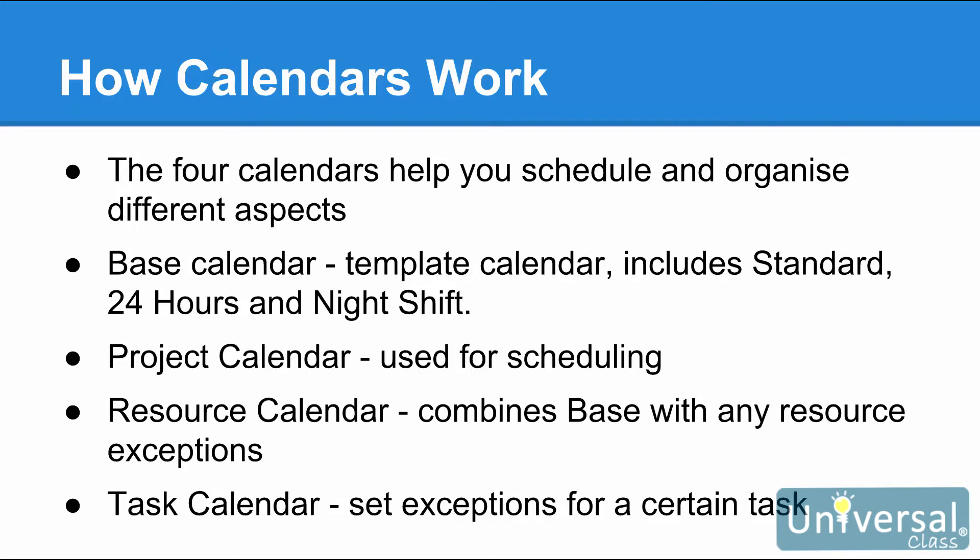The project calendar is the default calendar used for scheduling. It is also where you choose the base calendar template that you use for a project. The resource calendar combines the base calendar with any exceptions that you set for a resource. An example of an exception can be non-working times. The task calendar is where you set exceptions for certain tasks.